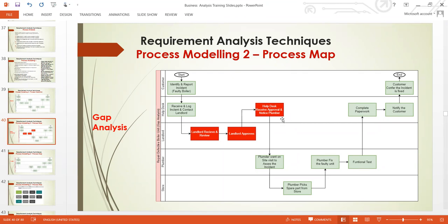Then as a business analyst, you need to start identifying areas that are not much important. Some of these areas are bureaucratic processes that are just taking unnecessary time. You identify it. I didn't say delete it. I say highlight it here, the way I've highlighted my own here in red color, so that when the management are looking at it, they will see the waste you've highlighted. All these red colors is waste of time you've highlighted. And once they remove this waste of time based on your analysis, it's going to save them 5 days. So you remove 5 days from that 15 days, and they will have 10 days to deliver. That is a lot of time you save them already.